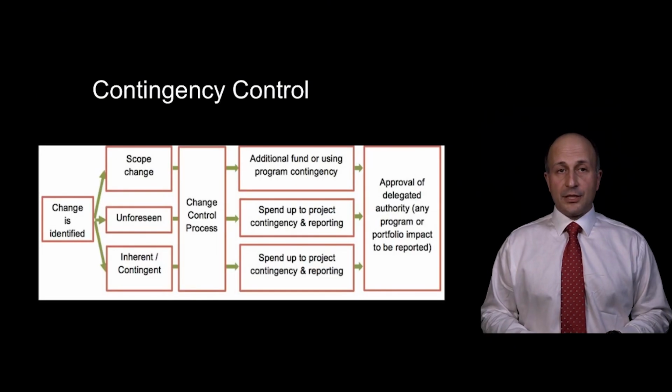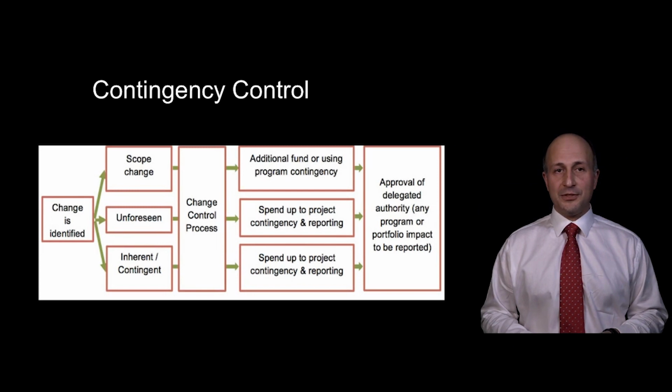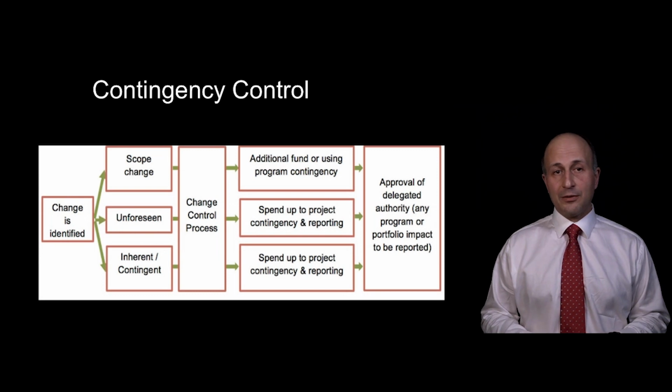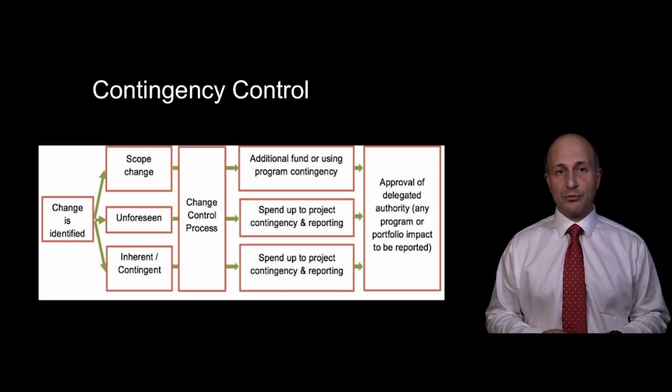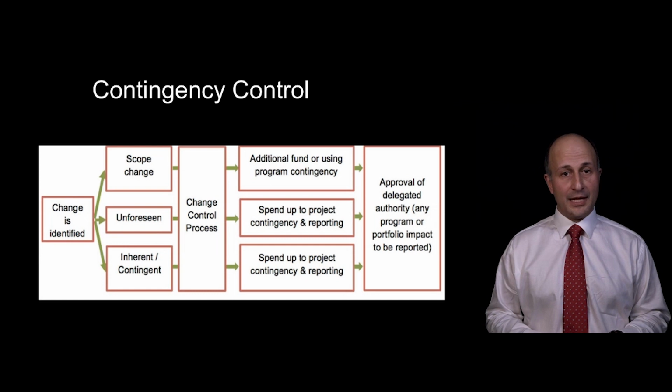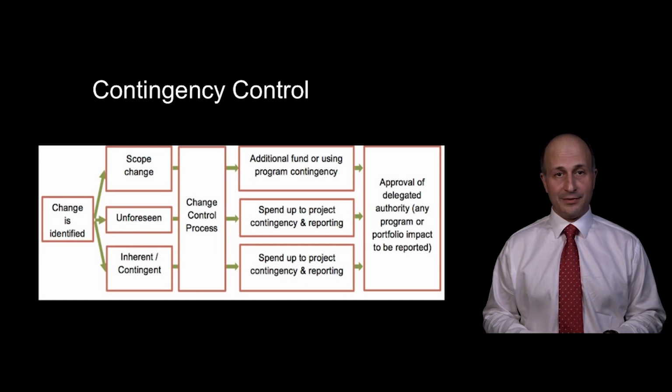Change control is a core part of effective cost contingency management. Contingency funds should not be released for any materializing risk or issue without passing through a gated change control process. The regular and consistent reassessment of contingency requirements and performance throughout the project lifecycle provides assurance and confidence at all levels of governance and enables proactive risk identification.